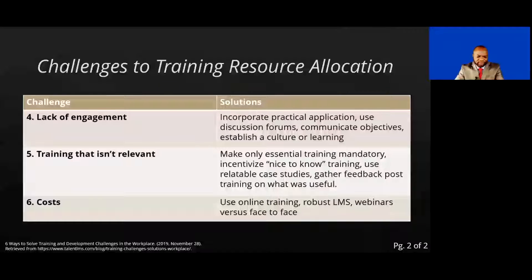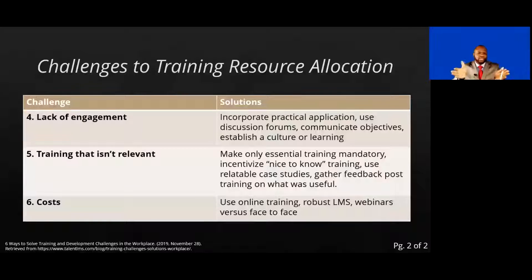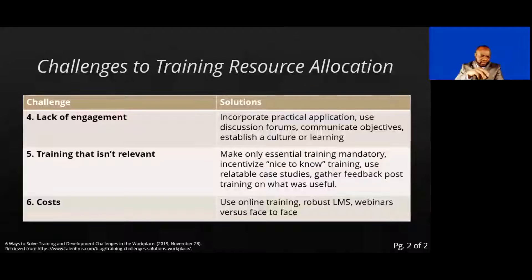One of the ways we do this in the world of agile is to have a team that has T-shaped skills. In other words, they have broad skills but also deep specialisms. If you've got a team with many people that have broad skills but various specialisms, they can cross-train each other on those areas of their specialisms, and that could be one way around training.